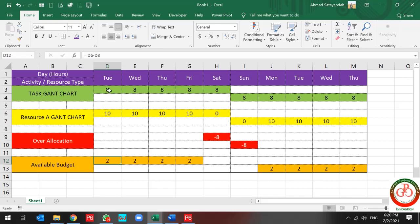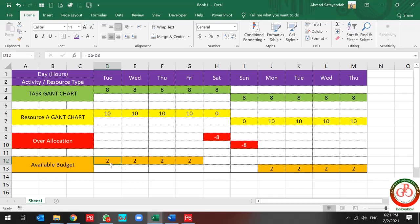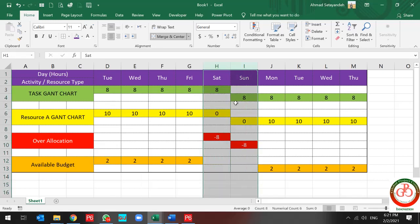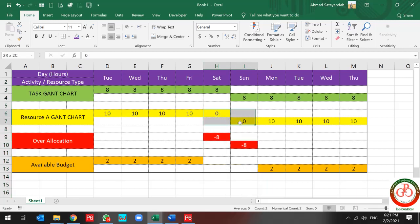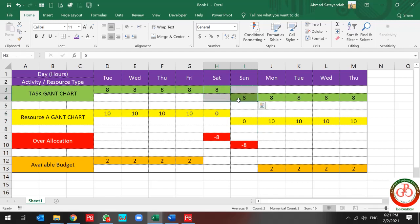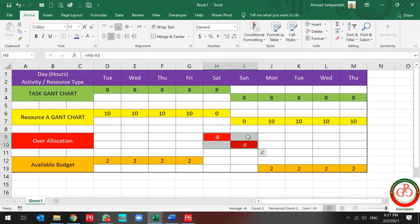But our task dependent does not work based on resource availability. So the resource can only work eight hours per day. So available budget per resource is two hours per day. But on Saturday and Sunday it's totally different because we don't have any available resource in these days, but we have eight hour work. So we face eight hour over allocation in these days.